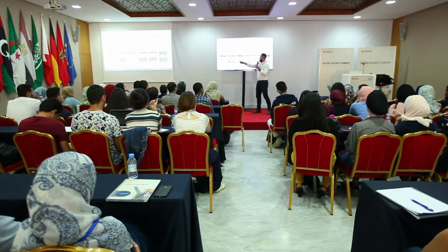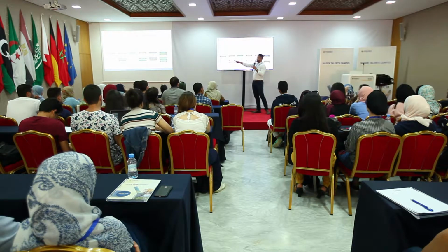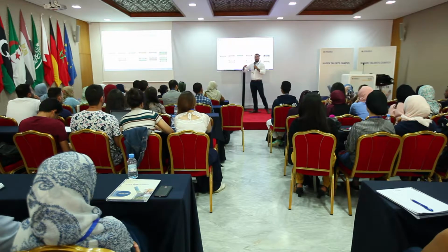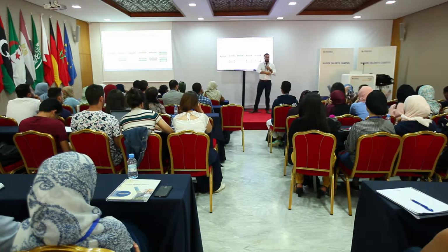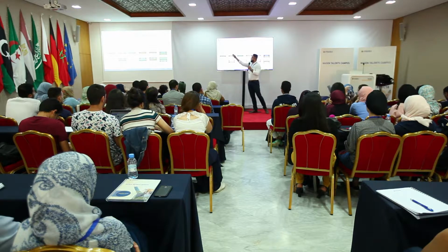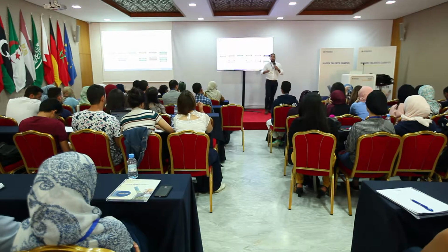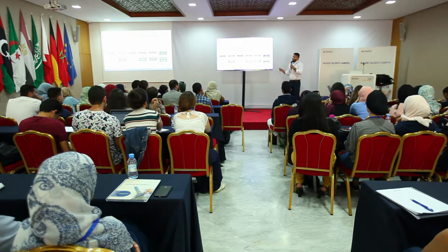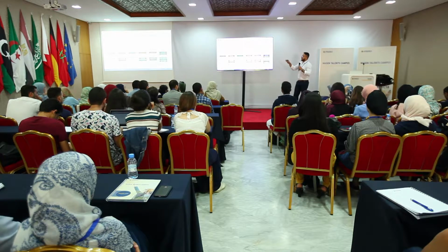Usually the contract between the constructor or the engineering firm and the developer is like, once you can certify that everything worked as the performance model, the simulation, for 6 months or something, then the contractor doesn't care anymore, and basically hands over the power plant to the owner, the operator. And this is the other phase of the project, which is the operation. 30 years, 40 years, you name it.